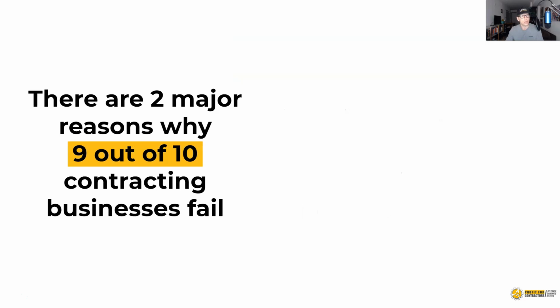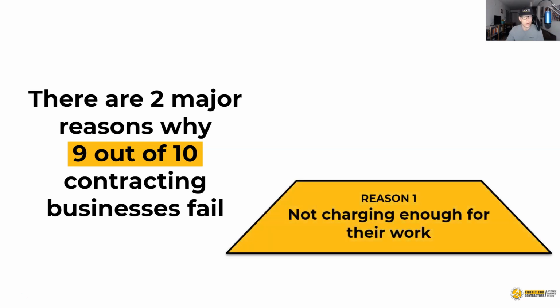Did you know that there are two major reasons why 9 out of 10 contracting businesses fail? The first reason is that contractors typically don't charge enough for their work. And this is just a function of so few contractors accurately tracking job costs. Because if you tracked job costs accurately, you would know whether you're making a profit or a loss on a job.